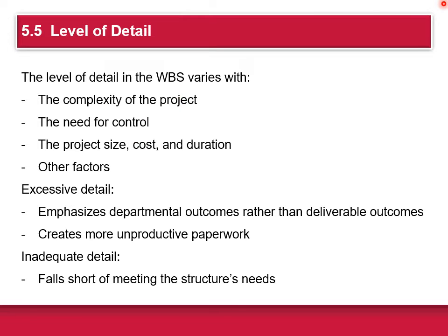So the level of detail in the WBS varies with the complexity of the project, the need for control, project size, cost, and duration, and other factors. If the structure reflects excessive detail, there's a tendency to break the work and effort into department assignments, and this can create more unproductive paperwork and cause a lot of problems. If you have inadequate detail, this falls short of meeting the structure's needs, so that can become a problem as well.